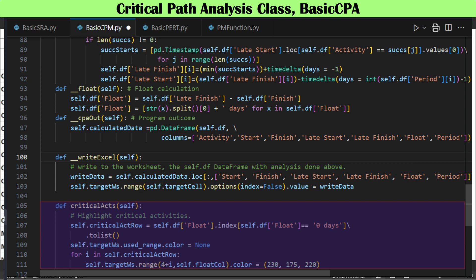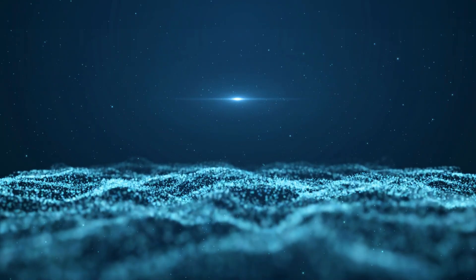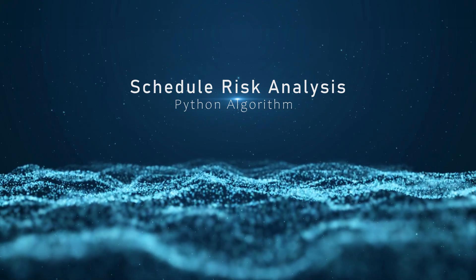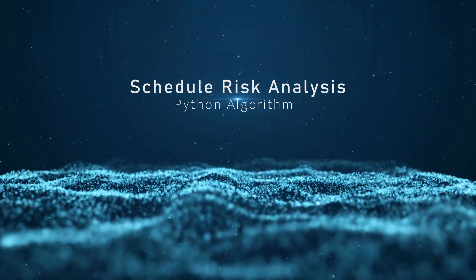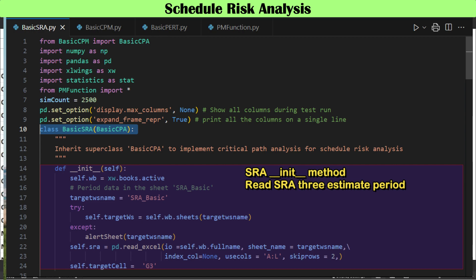Critical activities featuring zero days of float are identified and highlighted on the worksheet. Back to the topic of this video, we discuss the schedule risk analysis algorithm. The critical path analysis class we discussed is a superclass inherited to leverage schedule risk analysis program coding. When an instance of the class is created, Excel data is read from a worksheet named SRABasic, containing the three-point estimates of activity periods.